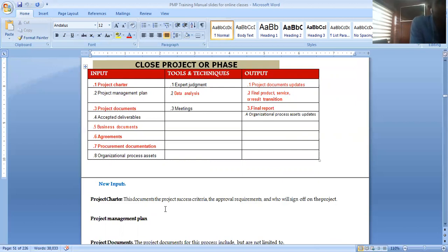At the closing phase, it is not a progress report. It's a project report, a closing report you're coming up with that has all. No, I'm talking about the phases. Yes, the phases. In execution, that's when you have a progress report. But in closing the phases, you need the status report to be sure that you have closed it completely. You're looking at the percent complete. It has to be 100% complete. So you look at that, you close it, you sign off. If you have contractors within, maybe the phases could be about installation of doors, installation of lighting fixtures, go in there and ensure that you have them closed individually.